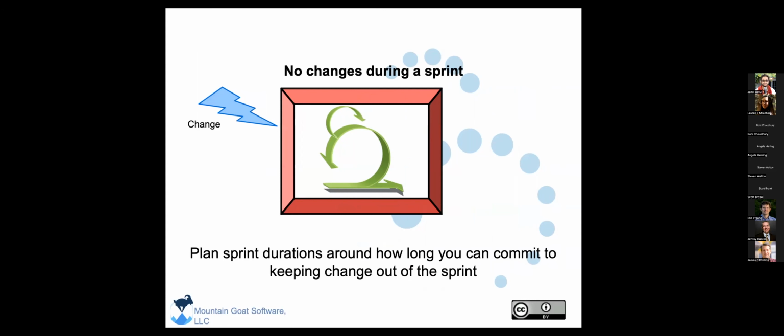Okay, something else special about a sprint. We don't make any changes to our plans during a sprint. If you have a sprint going, it gives people some certainty about what they're working on. And so it's important as a leader that you plan to stay on track with that for the whole sprint. There's a whole conversation we can have about if something really comes up, you cancel a sprint and start over. But the idea is that you maintain the same goals and objectives for the whole sprint, and you don't let somebody come in and tip over the apple cart.